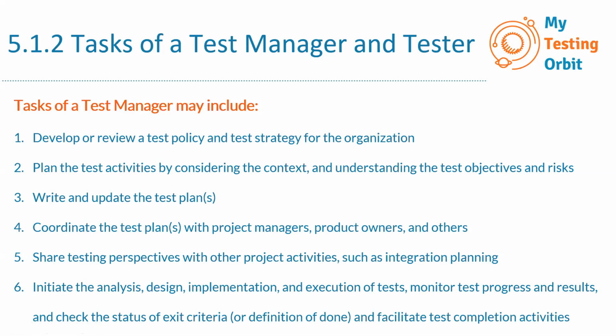A test plan can be taken differently for different types of SDLC models. Like in the waterfall model, maybe you will just write a test plan at the beginning of testing, and then that would be approved and signed by all the key people involved in that project. Or if you are doing agile, then this plan can be more of a continuing update as the project follows. So it depends on what kind of approach you are using, which SDLC model you are using. So a manager is responsible for writing and updating the plans.